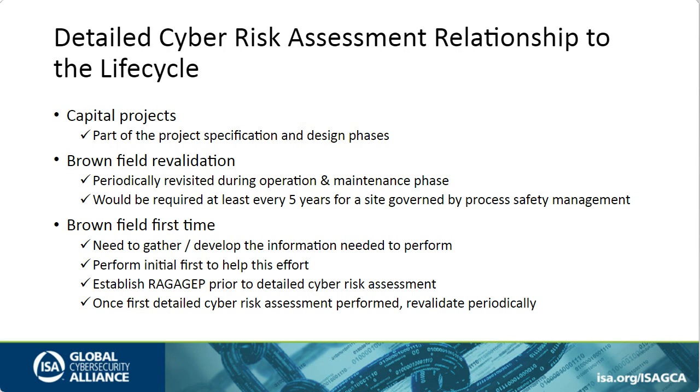Things change, the threat landscape changes over time, so a series of periodic reviews is very appropriate. For those facilities that are regulated by process safety management regulations, they've got a requirement that you would do that every 5 years.